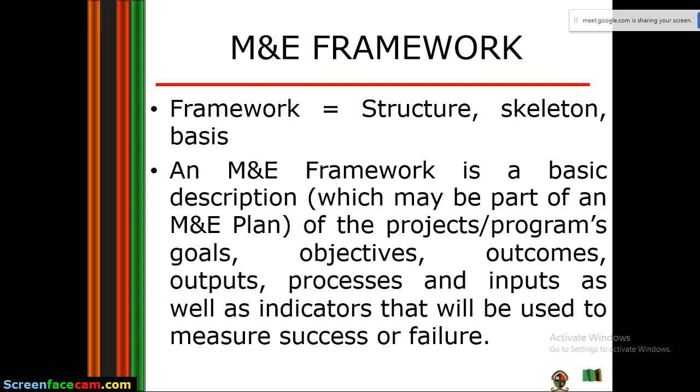What do you need to initiate that project, that program, the policy? You need to tell us how all these things are connected, starting from the inputs, how the inputs are leading to the activities, how the activities are going to lead to the outputs, how the outputs are going to result in the outcomes, and how the outcomes are going to result in the impact, and the impact is more like a goal, what we intend to achieve in the long run.